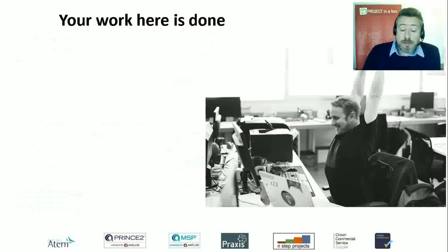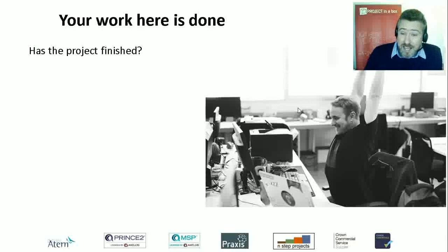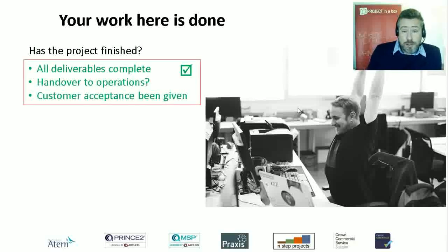So, your work here is done. That's great, but we ought to just check that it actually is. Has the project actually finished? Are all the deliverables complete? Everything that we said we were going to do at the beginning of the project, has that been done? Have the things that need to be handed over to operations or to the customer been done? Is that documented? Have we done all the training? We haven't just thrown something over the wall, but it's actually properly completed.